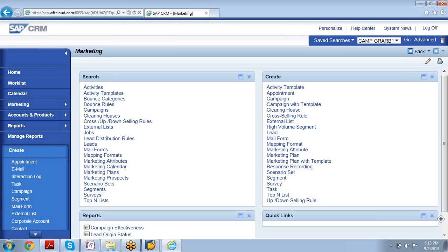The effort of customization in the whole project, if you calculate it percentage-wise, maximum would be 20% of the total time of our implementation in SAP. 20% is the customization time. The rest of the time goes on testing, on migrating the data, synchronizing the data with the other systems.